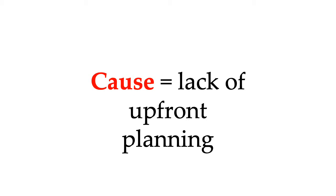The usual process is to finish the concept design, then have it costed for construction. Most construction estimates are a shock to the client. When shortcuts are taken early on and people rush into the design phase, then they do not discover all of the options they had, or what they really wanted to invest in. Without getting a full needs and options review conducted before the design is created, leads to blowout of design time, budget, and enthusiasm for the project. Discovering your real needs and options too late leaves you crying, if only I'd known.